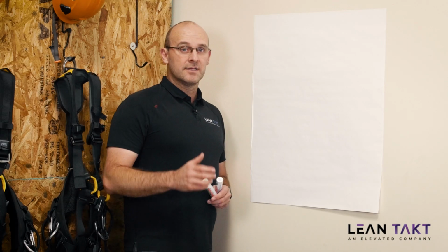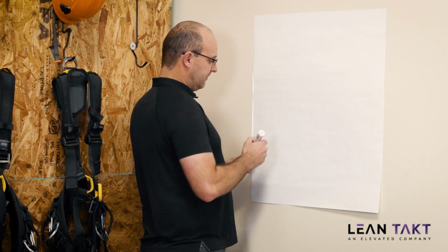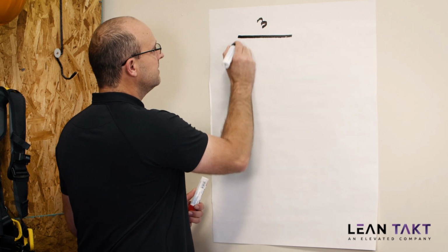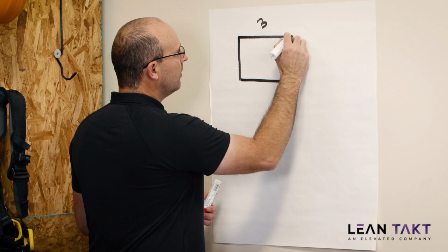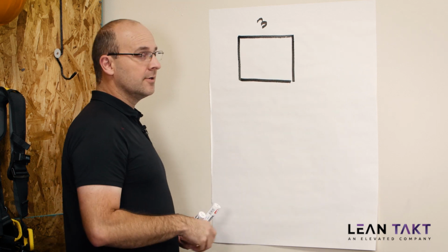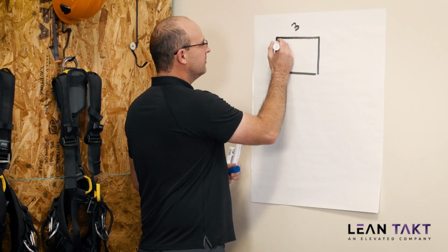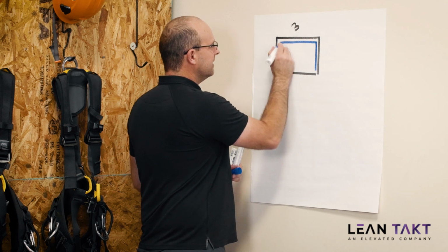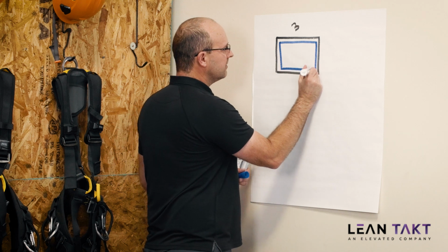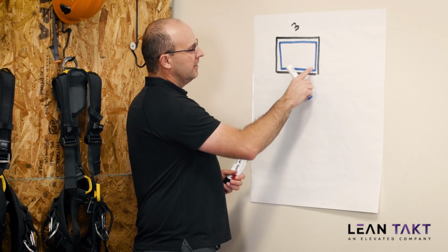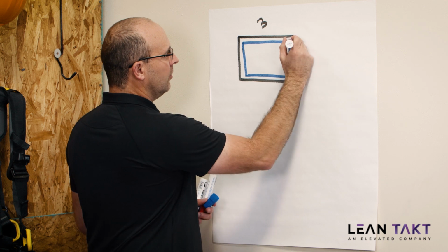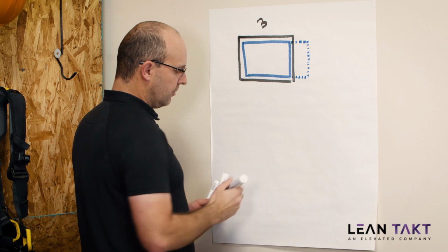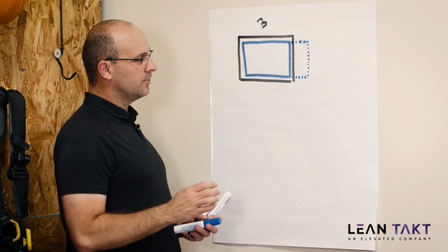What you want to end up with from a leveling perspective is that if a crew has, and I'll draw it like this, if a crew has 3 days to do their work, you don't want them, and maybe I'll get another color marker, you don't want them to, from a crew's perspective, go right up to the end date and get into a situation where there is possibly a chance where they would go over. Meaning, if they had a delay or experienced variation, they would go past their time. That's just going to rush and push and panic them.